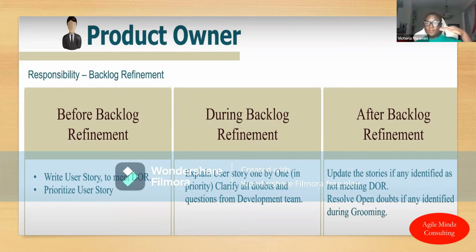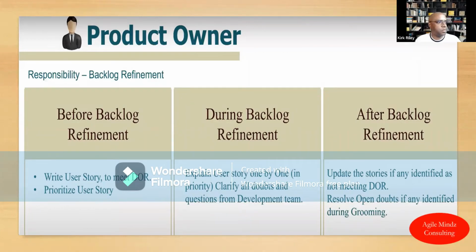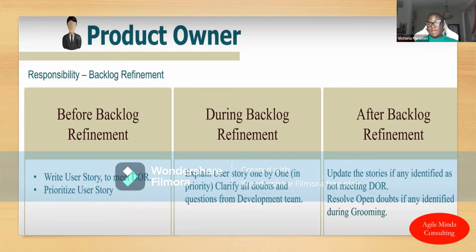So going through them one at a time based on their priority, answering any questions, and maybe from those questions, we might find a new user story or concept that he may have missed, that we can now create in the backlog, right? And even sometimes estimating of those user stories can occur during the backlog refinement meeting.